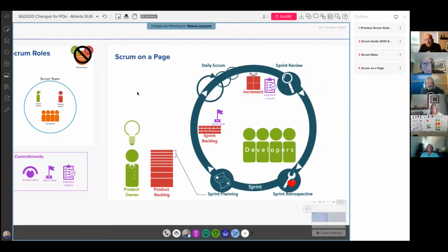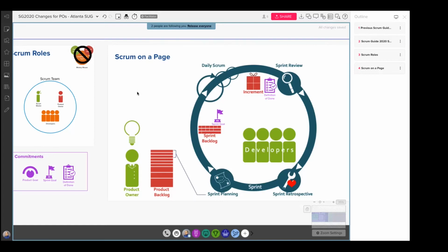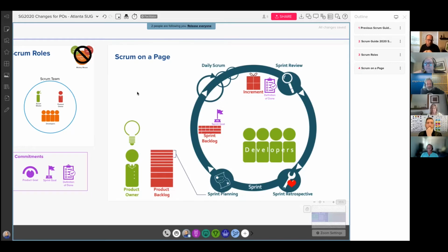And it's a litmus test, right? It's a bit of a canary in a cave, maybe. If you find that in sprint planning, it's difficult to come up with the sprint goal. If you find the team saying stuff like, well, we're going to do this, oh, but there's also this, and then this. I guess I question if we're really focused here, right? Are we trying to do too many different things, or are we just listening to the latest requests from our customers and just saying, all right, we'll just grab all this stuff, and we've lost that direction? And so this sprint goal has helped refocus Scrum teams a lot more with it.